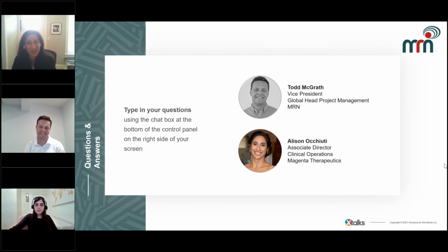That's a very fair question. So I'll give a personal experience. One of the trials that I worked on, I've actually done this a couple of times. If you think about all the costs that go into a trial in general, a lot of the costs you would usually have if you were to switch to a decentralized model will disappear on the site side. And it'll get picked up by the decentralized model. In this particular circumstance, it came out net neutral in terms of cost.